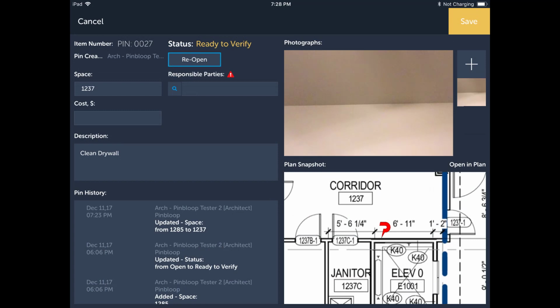If you find you are unable to activate the responsible party field, this is due to the fact that another key role is participating in your project, such as a contractor, which now has taken over that permission. An example is, if an architect and contractor are participating in the same project, the contractor will now be the participating role able to assign responsibility.